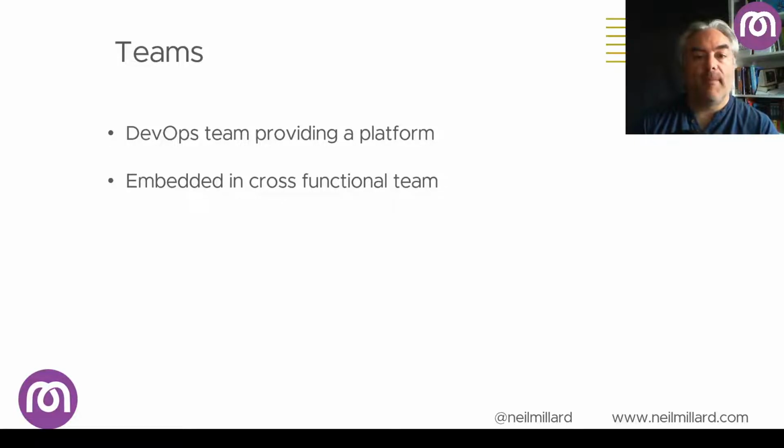The second method is where a DevOps functionality is provided by a team member within each team. If you've got 6 development teams, then you will have 6 DevOps specialists in each one of those teams. This is a good example of embedding a core dependency from an external team. In this way, we create a cross-functional team with all the skills required: developers, QAs, DevOps, operations, DBAs, or database administrators. So what does a team actually look like?